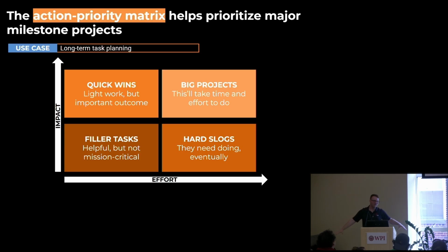Breaking those all down into, okay, the referees need a head ref and everybody else. I know the site logistics, there's going to be some amount of janitors and getting the field there and things like that. And just breaking down and down and down until you end up with the core components where there isn't really a way to subdivide them any further.